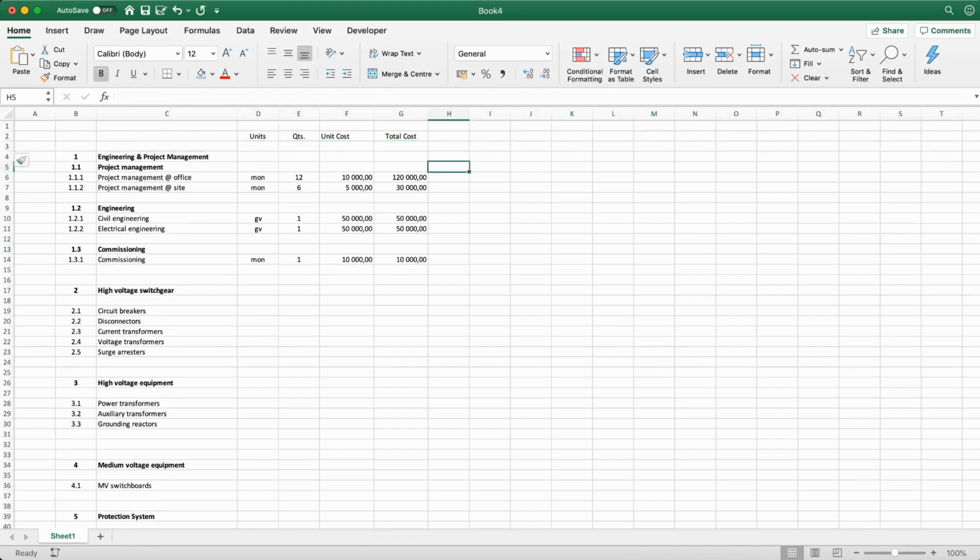But how much is this in the end? To start to have an idea of the subtotals of the project, we actually suggest using the subtotal function. To start to have some idea of the subsets of the project, I recommend that you always use the subtotal function. The reason to do so is because it's a more robust approach. Usually it's very common to have engineers using the sum function, which is easier, more straightforward in most cases, but there are also some issues with it.